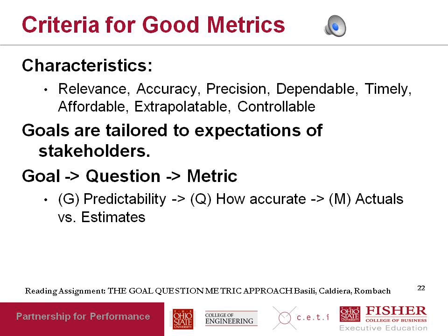So for example, in some projects, money will be released over time as you achieve certain milestones, and so if your costs are accruing to the project faster than you're getting reimbursed, even though your overall cost might end up being less than or the same as what you estimated, you might not be getting paid on time to be able to pay the people on your team, for example.